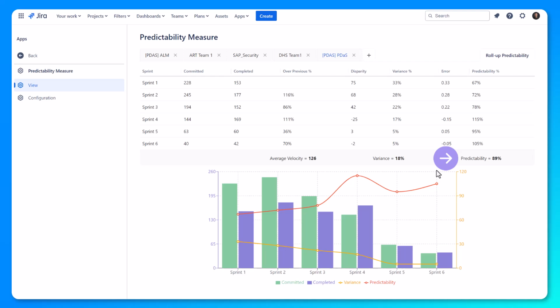Okay, so with an 89% predictability, we would hope to see an 11% variance. The 18% variance suggests a bit of undercommitment and over-delivery. It could be an indicator of issues with forecasting, unclear team capacity, or patterns in estimating and understanding the work that need to be addressed.